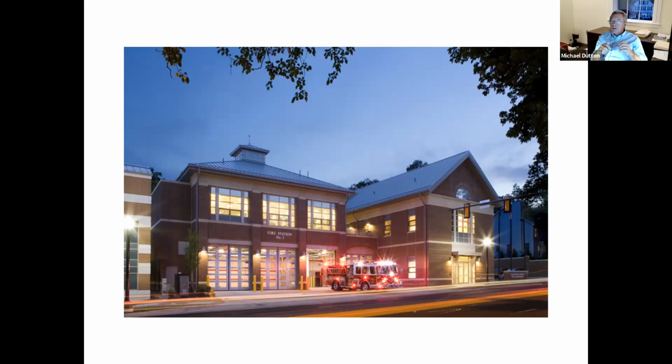But for example, this happened with the Mitchell School, I think everybody knows, the estimators came back and said the construction cost, not the total budget, but the total budget was 80.6 million. And I think the construction piece, say it was 72 million. And the actual cost came back at something like 50 some odd million. So there was a huge savings on that project, but I think Brian's right. I think that was just the perfect timing when that project went out, just luck of the draw. But in that case, there's a project budget which is substantially less than what people voted.